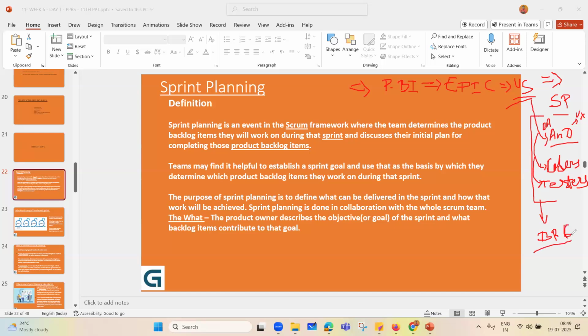Why do you need to do it in the backlog refinement call? Because it saves time in the sprint planning meeting, right? Yes, you are well prepared well in advance, and then you come back and commit here in front of every single team member who will be participating. So now, how will that be achieved?